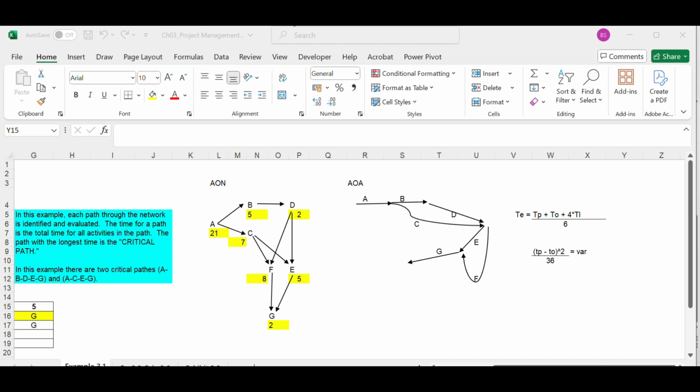We don't need a WBS for a top down approach, but we need to summarize. We are dealing with a lot of summaries when we talk about the top down approach. Some methods used for top down approach include the consensus method. This is a common agreement between team members. A group of people sit and discuss and reach a consensus based on escalation factors.